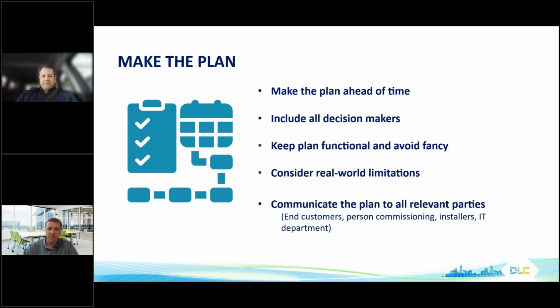Include all of the decision makers when you're making the plan, because NLCs are not exceptionally challenging, but you've got to keep all the perspectives in place so everybody knows that it'll work for them. Keep the plan functional and avoid fancy. There's lots of really good systems out there, and they have tons of crazy features. I recommend not using them unless there's a specific purpose towards using them. Generally speaking, the simpler projects seem to go smoother, and they seem to have happier end customers.